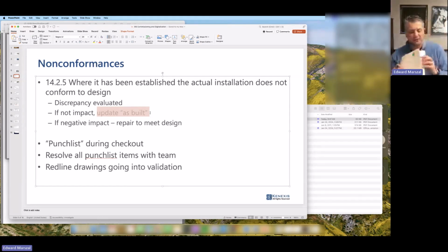What I showed you was the mechanism of writing down what the problem is in the worksheet. Also, when I was at UOP, I would do dedicated punch lists. So instead of just leaving that information in each individual folder, I'd have a separate kind of report where I concatenated, brought together all of the things that needed to be redone and put them in a single report. So that report is properly called a deviation record, but in the colloquial oil business, we just said it's the punch list.